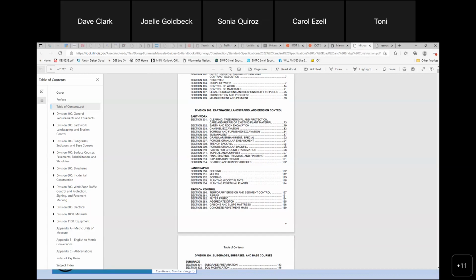And as I mentioned last week, when you have a pay item that you're looking at and you're going to bid it, look at the first three numbers. The pay items are all an 8-digit number. The first three numbers of that pay item is going to refer you to the section in the spec book that covers that pay item. So pay attention to that real closely.